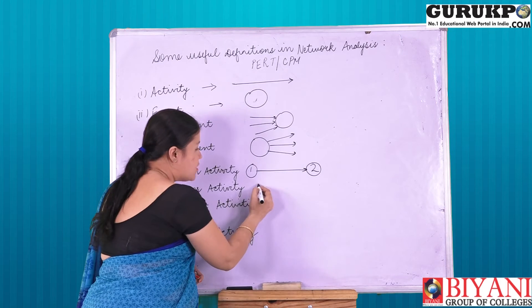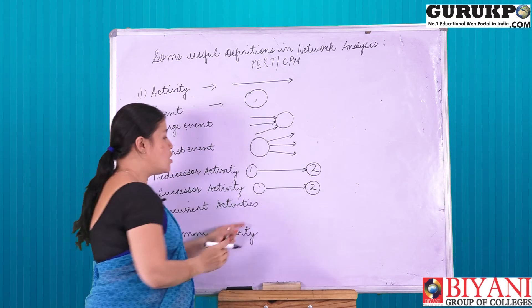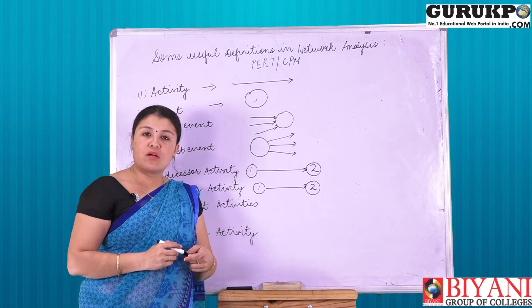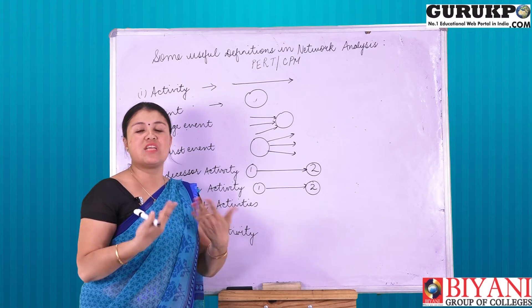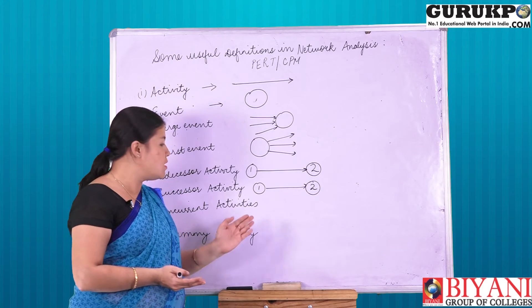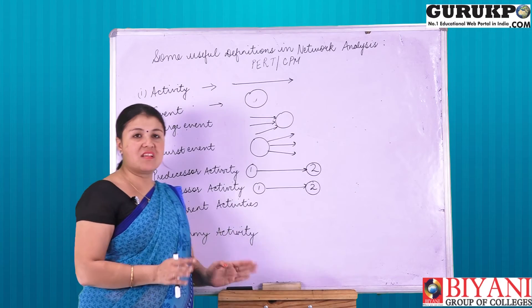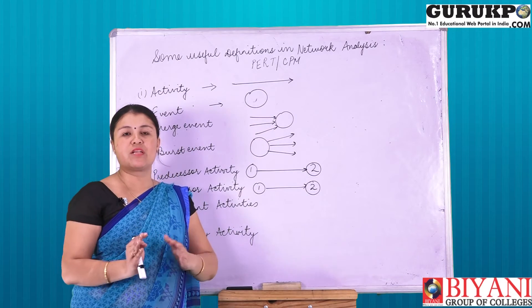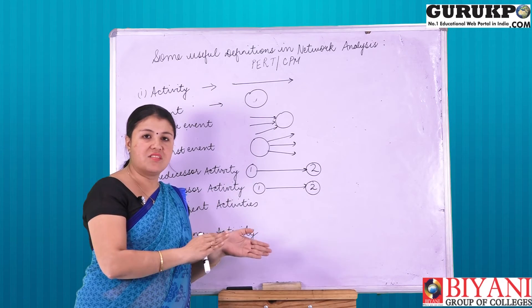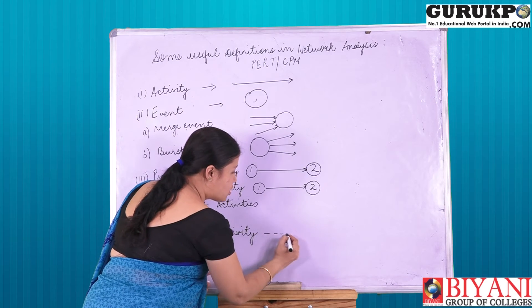Next is successor activity. For activity one, the successor activity is two. Next are concurrent activities. Concurrent activities are those activities which can be started simultaneously by using the same resources and time. The last one is dummy activity. A dummy activity is basically an illusion — it does not connect to another activity but merely shows a connection between one activity or event to another. It is indicated by dotted lines.